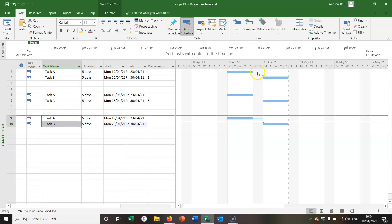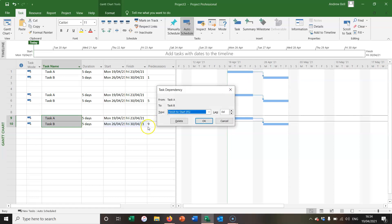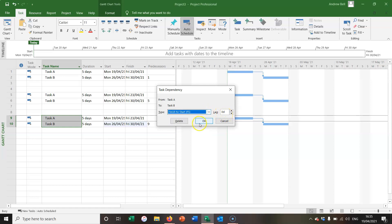Now then, if I double click this arrow, well, if I hover the cursor over the arrow, it tells me it's a finish to start relationship with no lag. But if I double click the arrow, I can actually change the amount of lag I've got or change the relationship type.